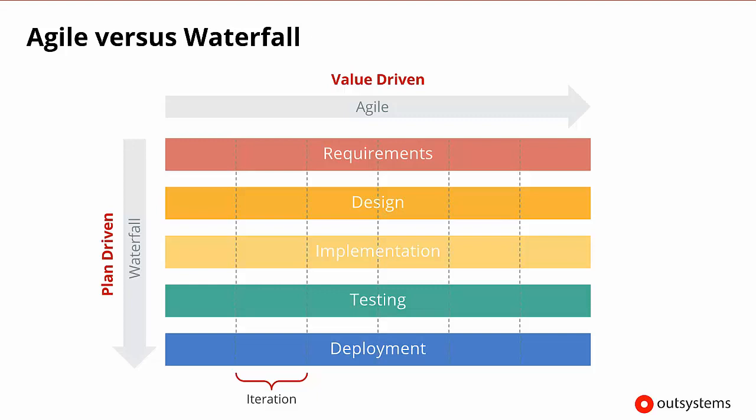Agile is value-driven, going through several iterations, sometimes called sprints, and each sprint comprised of the stages we just described, but with a list of deliverables planned for each sprint. The deliverables are prioritized by business value as determined by the customer. Also, users can provide feedback about the solution at the end of each sprint, thus keeping the solution closely aligned with their needs.